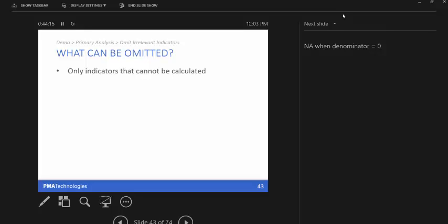For example, PDM logic, or I can think of a better example, redundant links. In both of those cases, the denominator, this is an extreme case, is all links in the schedule. In the redundant case, it would be redundant logic divided by all links. If your schedule had no links, then we can't divide by 0, so you would be able to turn off that indicator.